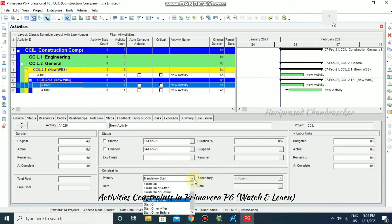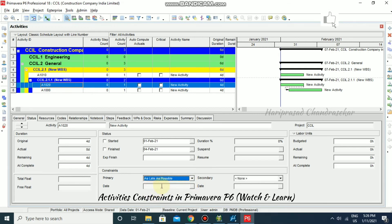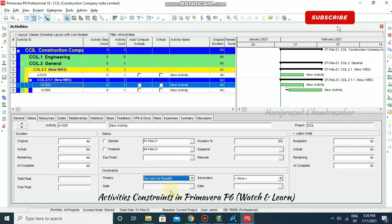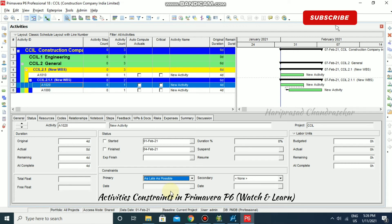Finally, we also have the late constraint, which is as late as possible. We can't select any specific date for this constraint. It's a restriction that you impose on an activity to work until it gains sufficient float that allows it to start as late as possible without delaying its successors. This constraint sets the early dates as late as possible without affecting successor activities.